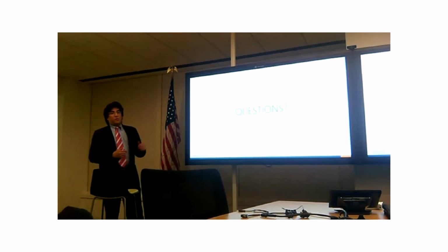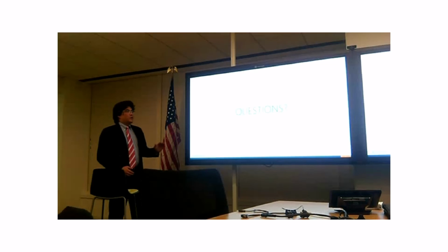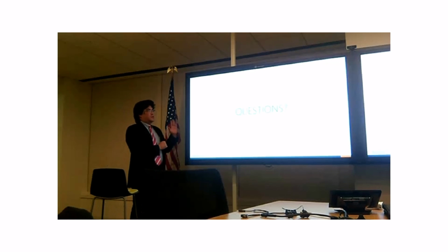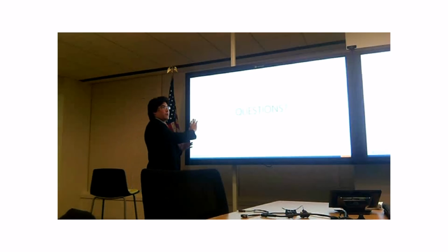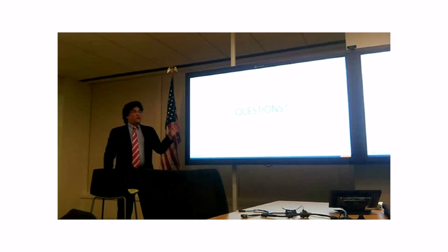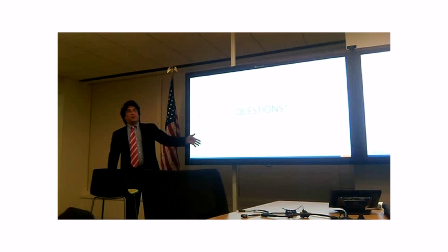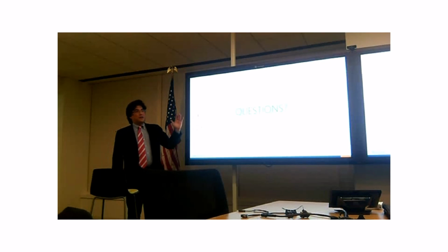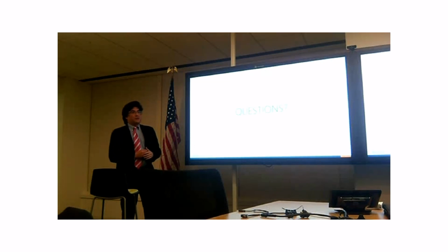What Forrester has done, or what some of these organizations have done based on the study, is say we're starting off with a slow transition. We're going to move 500 people here, then 1,000, then 200, and they just manage it like that. That manages the risk: let's get early adopters, let's work through that, and then we'll see how that transitions without having to invest too much in training in the first year.